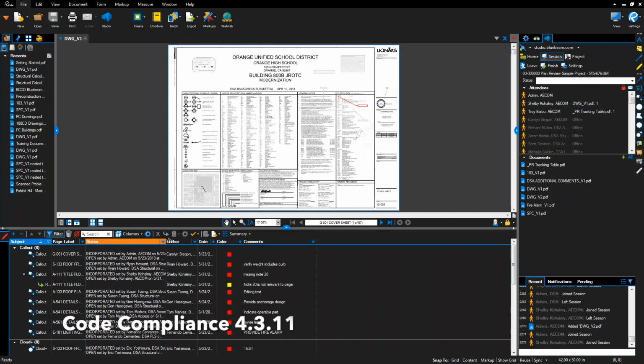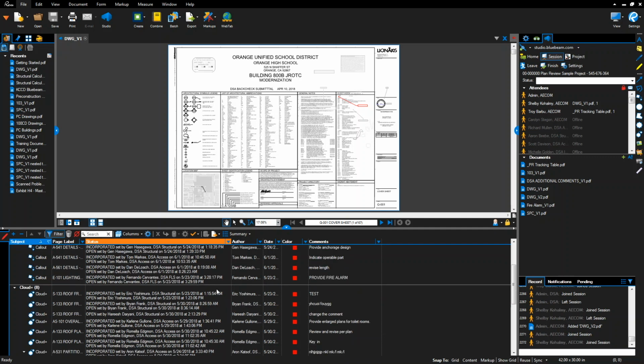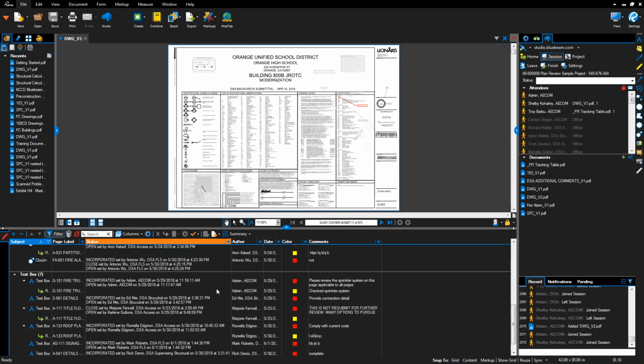The DSA Plan Reviewer will then confirm if documents are code compliant. If documents are not code compliant, there will be an opportunity to make required changes within the Bluebeam Studio session. If code compliancy cannot be achieved using Bluebeam markup tools, then corrections will be made out of the session. If code compliancy is achieved, DSA will proceed with the stamp out procedure. Stamped documents will be placed in the Bluebeam Project Approval folder and uploaded to DSA Box.